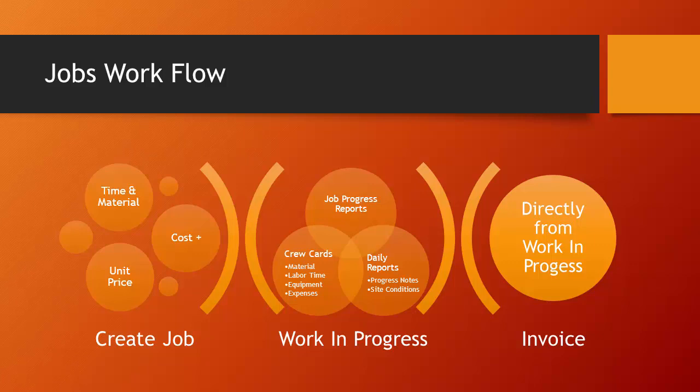Correct. And we've got cost code and category support through all this. We can break out everything by material, labor, equipment, subcontractor, and expenses. We use X3's native expense system, integrate to that, and can pull expenses into crew reports, right? Correct. So if they filed a hotel stay, a food expense, a travel expense, or mileage, that can come directly into the crew report, be approved as part of that day's crew report, and then pulled directly into our CostPlus or time and material invoices.